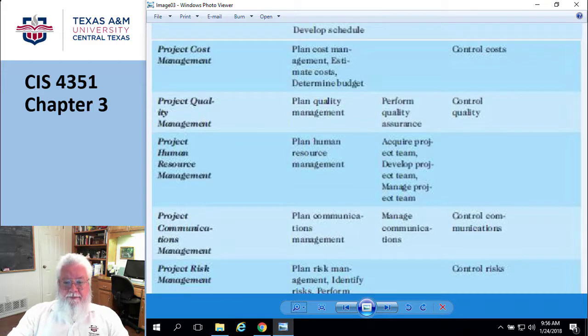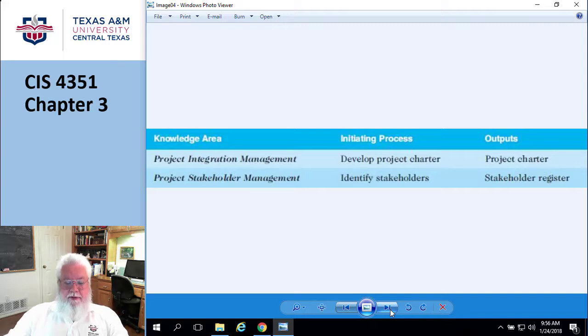So the first real one of these things is initiating. That was all pre-initiating. So on page 94, they have the real honest to God initiating, where you're probably going to do two major things. You're going to identify the stakeholders, and you're going to develop a project charter.